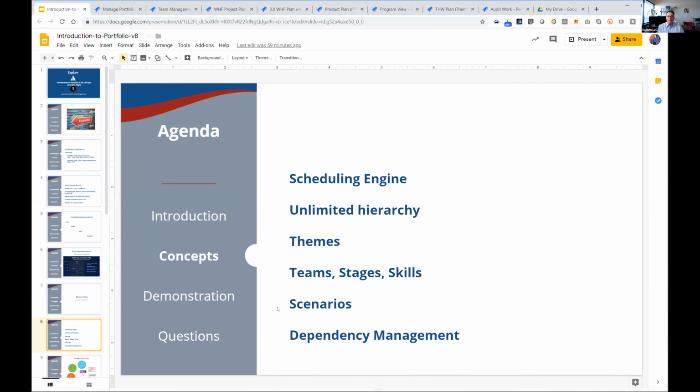So on a simple level, you can have initiatives that drive epics, that drive stories, that drive tasks or subtasks. And then you can also add more layers. So you could have initiatives that drive major epics, that drive stories. Or you could have initiatives that drive features, that drive epics, that drive stories. There's many ways that you can do this, and it's very flexible in its configuration, just like everything else in Jira.